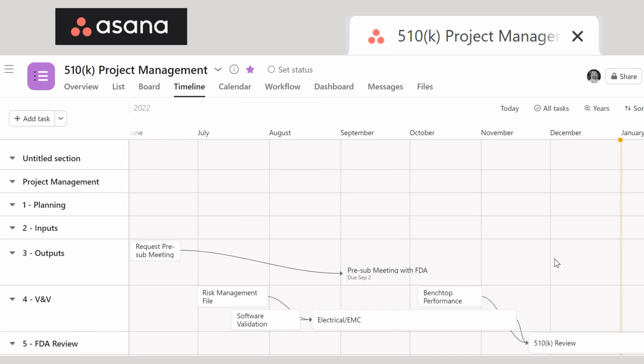So we said we're going to submit this to the FDA just around Thanksgiving. So it's going to take all of December, all of January, all of February, and sometime in March, you will get your 510K clearance. That's best case scenario. Now we're going to work backwards from the end in mind. The end in mind, we're going to submit it Thanksgiving, best case scenario.